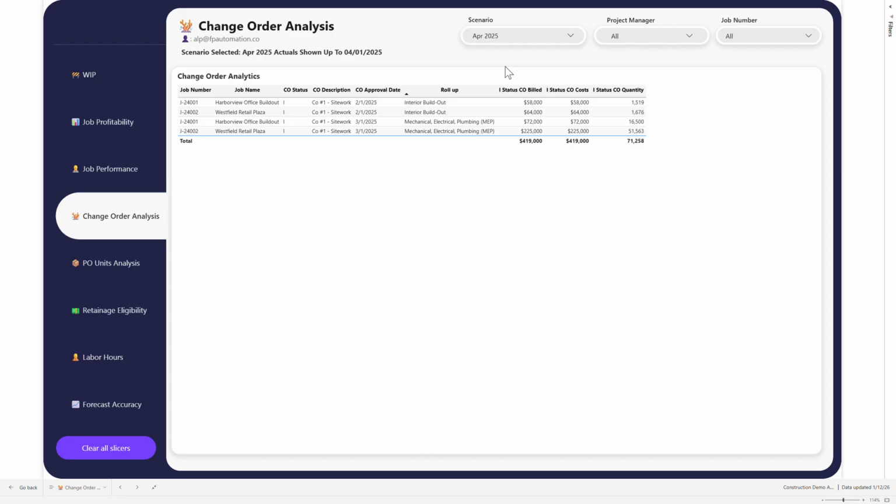Now, what I'd like to do is talk a little bit about in-progress change orders and how they differ from approved change orders. In-progress change orders are essentially change orders that have been agreed for the team to be worked on, but do not have contractual approved agreements in place between the client and the contractor itself. And this presents a major value leakage issue for contractors because, at the end of the day, many contractors can negotiate all change orders that have not been approved and ensure that they collect the necessary revenue at the end of the job.